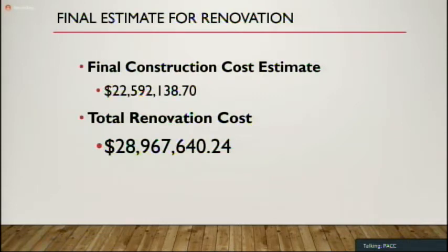Fast forward 6 or so months to a few weeks back, when we received the cost estimates, which we're going to present in a minute, for what it would cost to tear down the existing TCP building and build a new building. It caused us to question whether those costs were high enough, and the price per square footage was significant enough for us to ask the architect if the numbers that they had quoted us or estimated back in April were enough to construct the project.